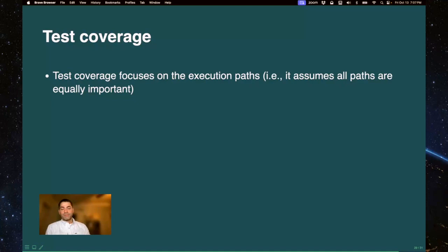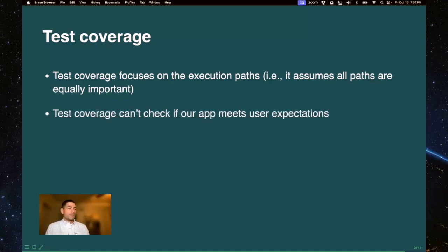That's really where I think something more like a traceability matrix, where you can actually identify specific functionalities and match them to the tests that check them, is a little bit better. It's a good communication tool between you and users and stakeholders, and with the development team. You can have a traceability matrix that maps out those primary, those key features, and make sure that the tests are written for those. Then as you progress throughout the life cycle of the project, as long as those tests are passing, you can continue to add functionality and list the tests in that matrix.